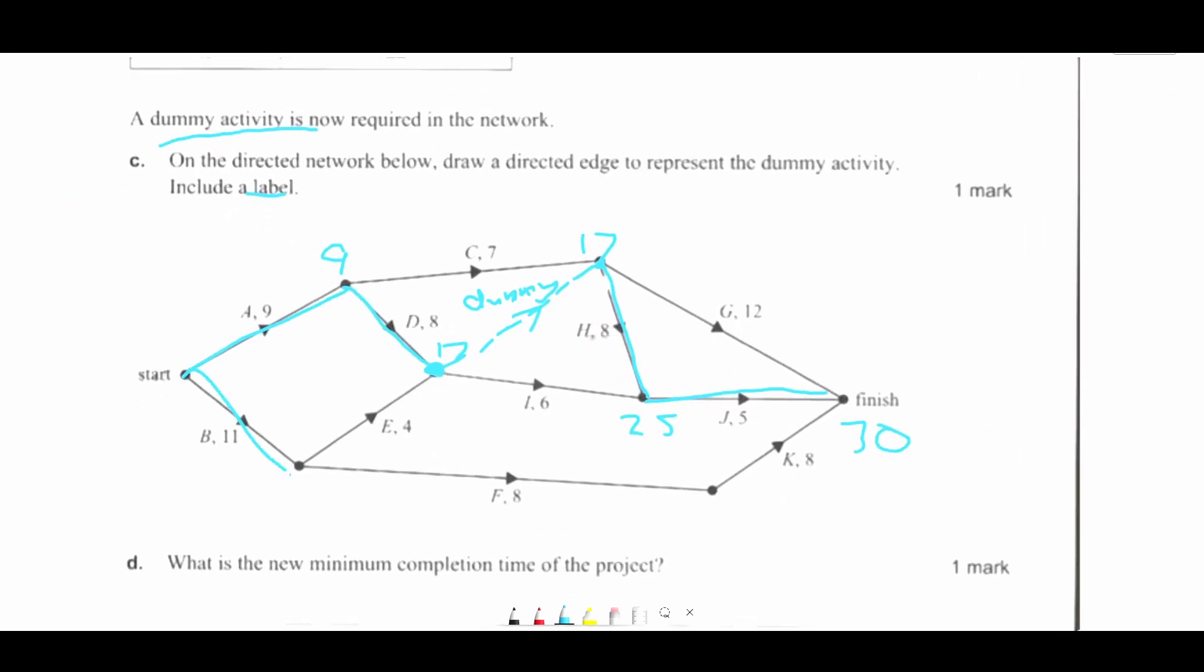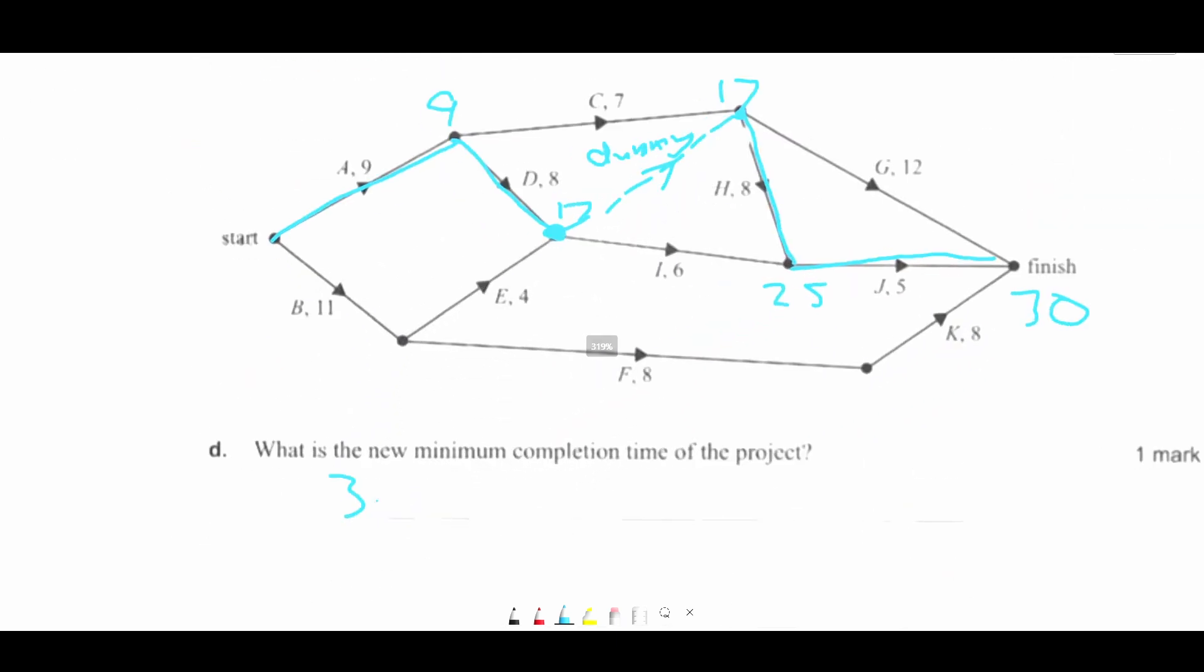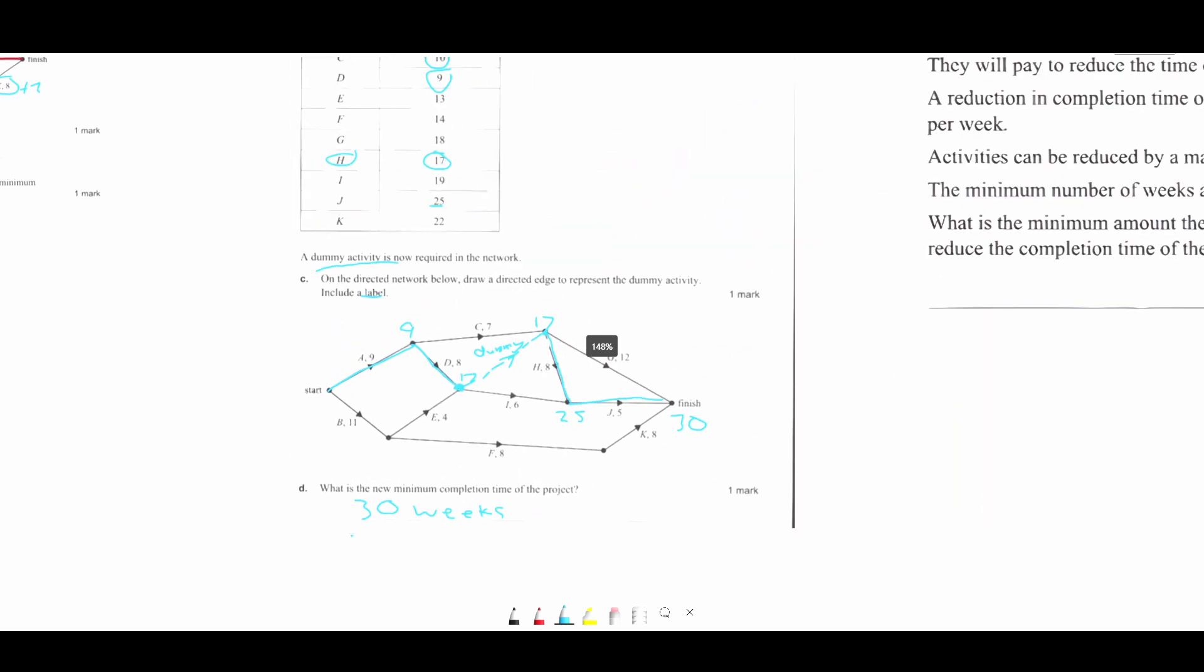11 plus 4 is 15, which is lower. And this is lower than 30. So 30 should be the critical time, the minimum time, the minimum completion time, 30 weeks.